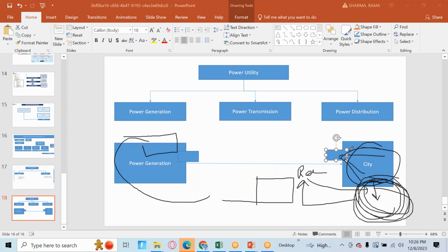Okay, and then once it is approved, we can convert it into budget, we can transfer this budget to the project use. So let's say when we are submitting this requirement, at that time it was given 10 million USD. Then it reaches the next level to understand the requirement, and they have cut down a few things, and then they reduce it to, let's say, 9 million USD.